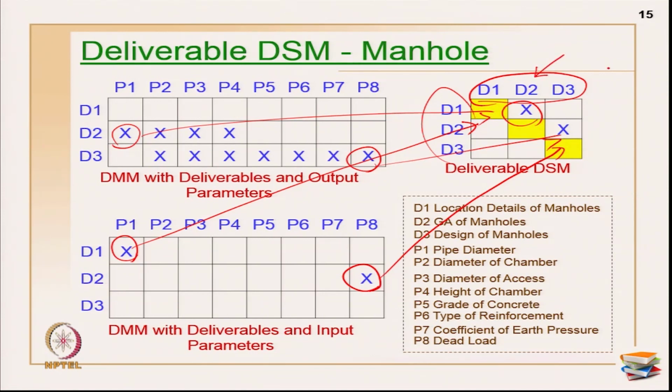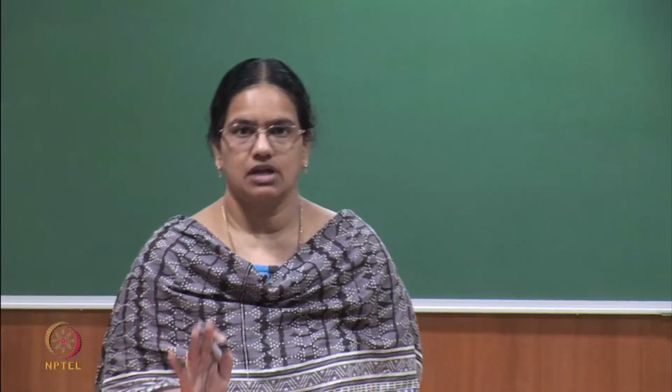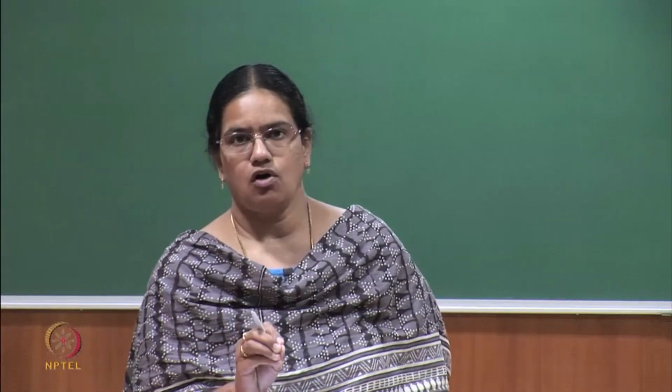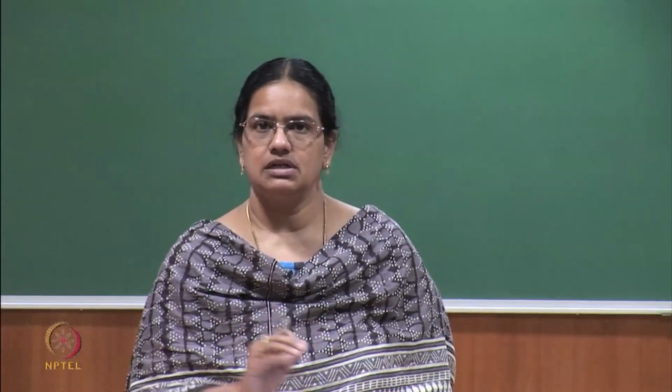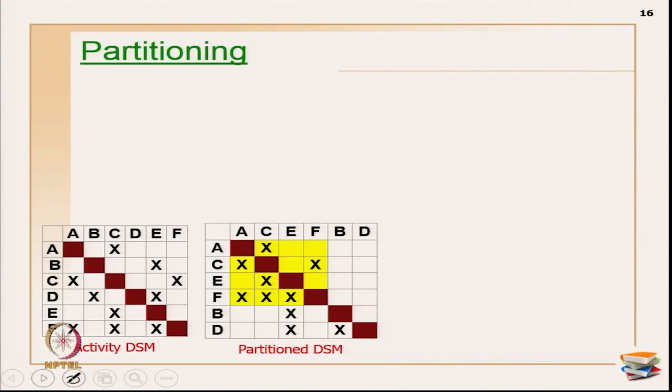Once this is identified, for identifying X marks, you can multiply the variable matrices and you will still get the relationships identified. Then go through with the experts, see whether everything has been identified, and then validate your matrix formation. Because if you identify a wrong matrix, then obviously your results are going to fail very badly. So, you have to take care. That is all about matrix formation.